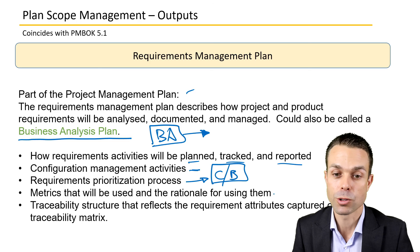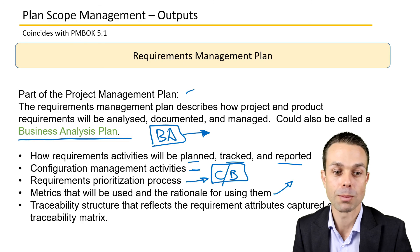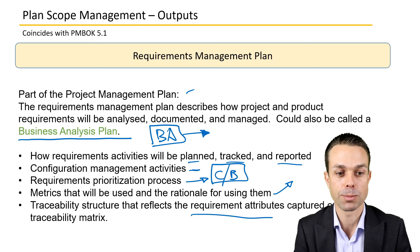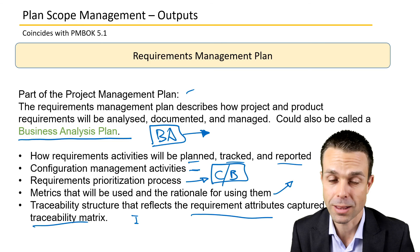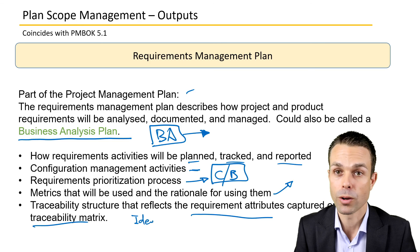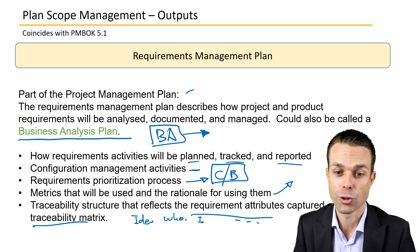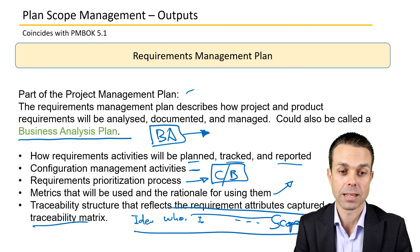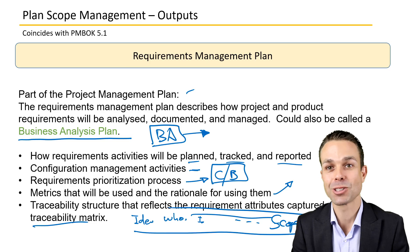Prioritization might be based on cost, benefit, or other factors, and that can be documented here so everyone is clear. The plan also includes metrics and the rationale for using them — typically around benefits or sequencing — and the requirements traceability matrix structure, capturing attributes like an identifier, who raised the requirement, what the requirement is, any risks or costs involved, and the scope item that meets that requirement. This ensures we understand that we are delivering what the customer wants. And that is Planning Scope Management.